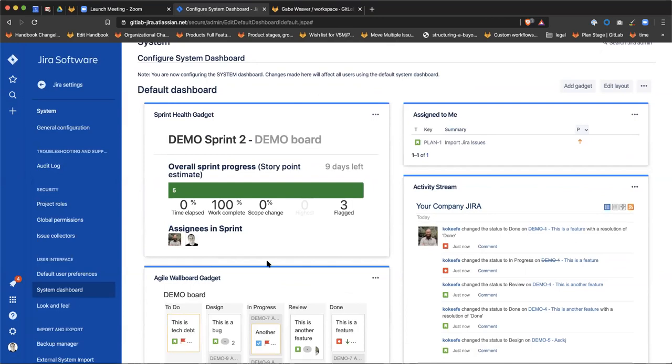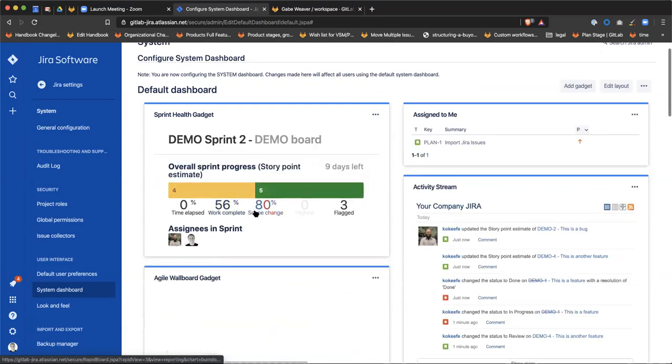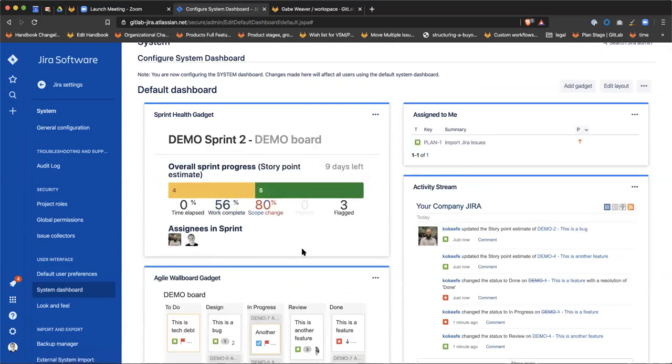Well, I don't think we put story points on. We only put story points on one. So if I update this to have some points, now if you refresh it, it should show that work isn't completely done. There. Oh, yeah. But you changed the scope. Well, I added weights to issues that didn't have weights, and so yeah, it was like an infinite scope increase.